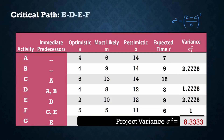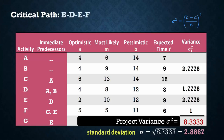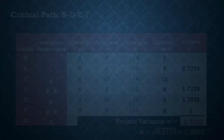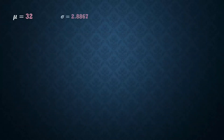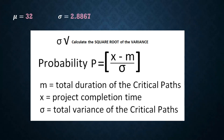Then taking the square root, we have the project standard deviation of 2.8867. Although the uncertain activity time estimates are beta distributed, we can approximate the project completion time by a normal distribution. In this case, with mean equals 32 and standard deviation 2.8867.